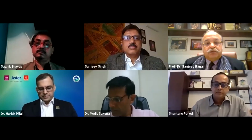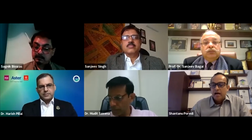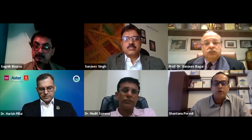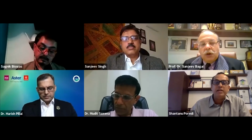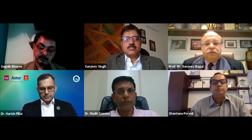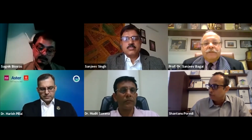Thank you, Dr. Bagai. Just like to add on that aspect of lighting. Lighting is not generic when we design it for a hospital. So what we do is in the beginning, we create something called a room data sheet. And a room data sheet actually has information or data about every aspect of each room. So if you have a hospital which has 1,000 different rooms, you would have 1,000 different room data sheets.